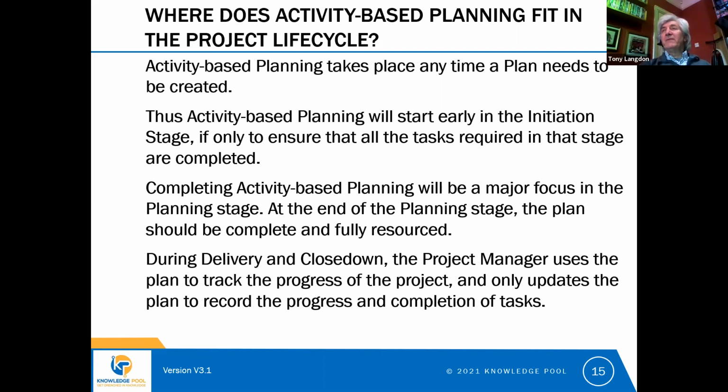Now, you might imagine that in the planning stage, we also create another plan. And the plan we're creating during the planning stage is a plan for the delivery stage. That's going to have lots and lots of detail on it about all the tasks that are needed to build all of the deliverables that are needed by the business to achieve the outcome and the vision that was set for the project.